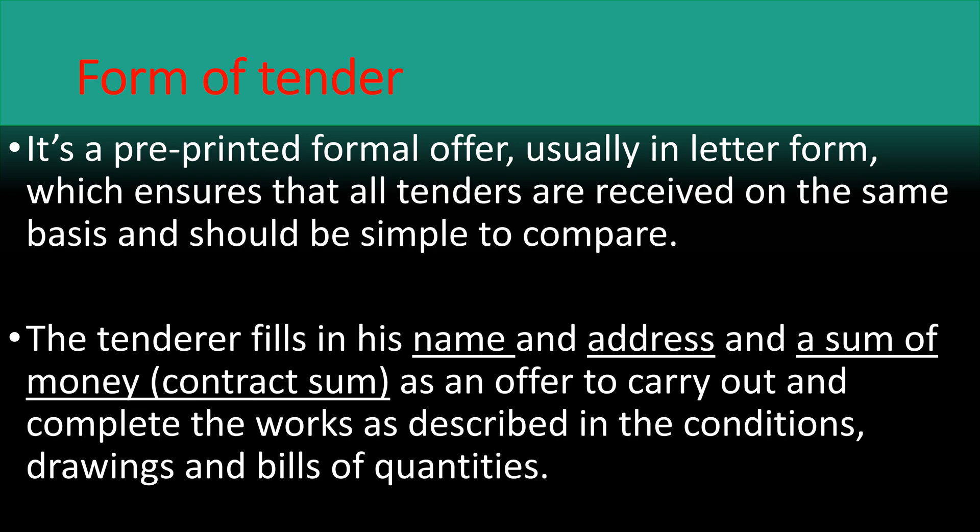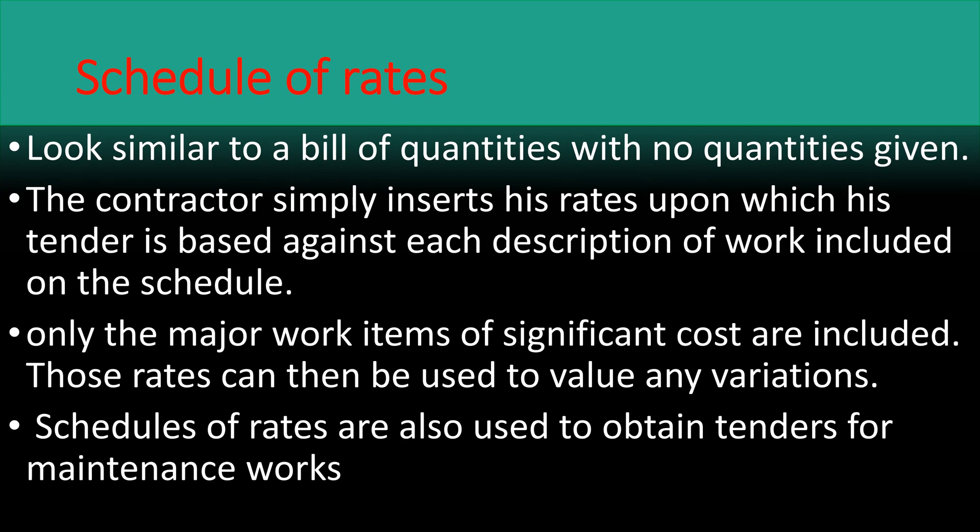The fifth document is the schedule of rates. In appearance, they are similar to a page of bill of quantities without any quantities given. The contractor simply inserts his rates, upon which the tender is based, against each description of work included on the schedule. In practice, only the major work items of significant cost and value are included. Those rates can then be used to value any variations. Schedule of rates are also used to obtain tenders for maintenance works. The difference between the BQ and the schedule of rates is that the schedule of rates does not have the unit rates filled in — the contractor fills those in, so that we can compare between different contractors and award the tender.